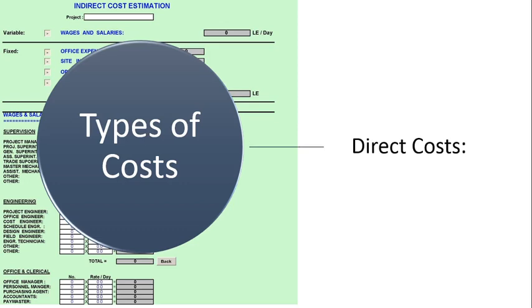Direct costs. Direct costs are expenses that are billed directly to the project. Examples of direct costs are team travel expenses, team wages, costs incurred for recognition and awards for employees, etc.